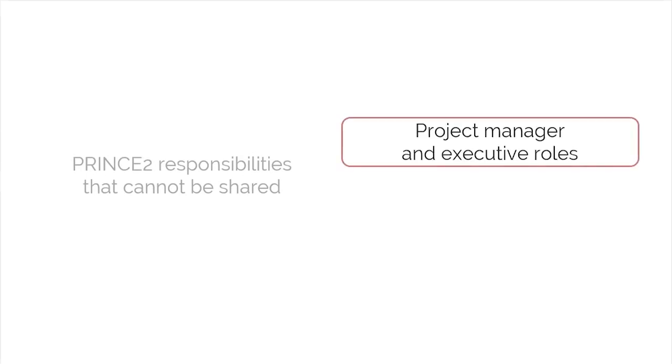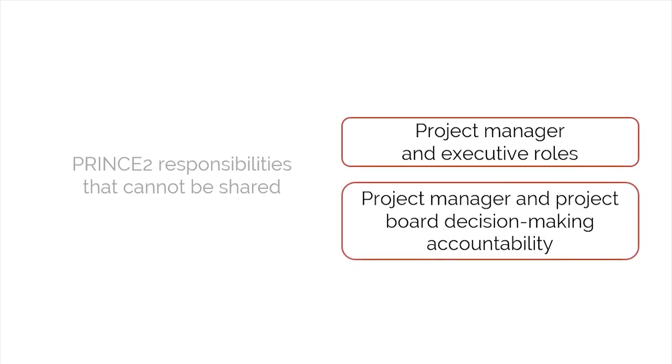For example, the project manager and executive roles cannot be shared. The executive cannot play the role of project manager, and there cannot be more than one executive or project manager in a project. Similarly, the decision-making accountability of both the project manager and project board cannot be delegated.